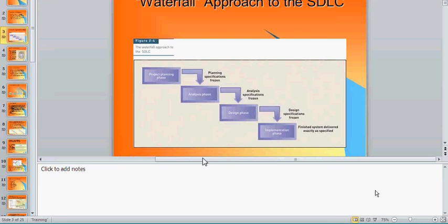Once we know the concept, we conduct a feasibility test. We lay out different options which could drive us to the solutions, and then do the feasibility test based on the cost-benefit analysis and the time frame that we have. Based on that, we rank which options are best, and accordingly, we recommend the best option.